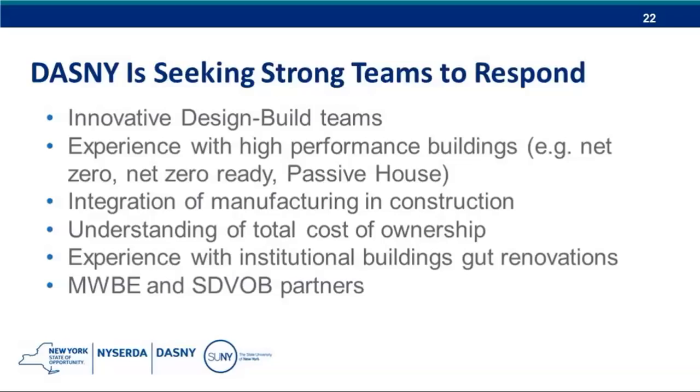Okay, the next question we have is, will the procurement process follow the same approach as all other SUNY contract awards? This is a challenge for some smaller firms that have not had prior SUNY experience. So, no, this won't be the typical approach because, again, we are going with the design build. And in the design build process, the RFQ that's going out is looking for qualifications of design build teams, where it is the team that is being judged, and certainly smaller firms that have a combination of team members are going to be very eligible for this.